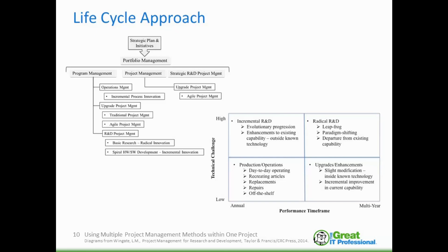The diagram on the right provides a model that helps you assess where a project or elements of a project might fall, based on the technical challenges and expected performance timeframes likely to be affected. For example, a project with significant technical challenges and a longer expected performance timeframe would likely include elements departing from existing capability, possibly incorporating R&D or early development. Having a perspective on what is driving your initiatives helps provide context for your project structure and chosen management methods.